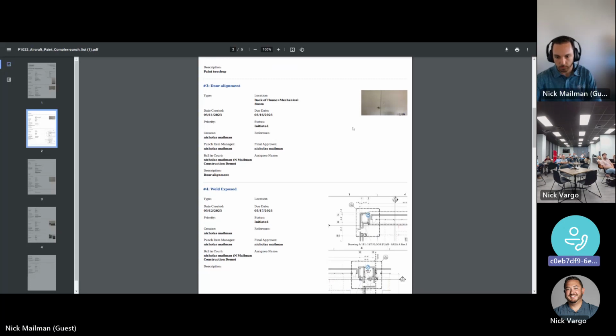I think it comes out on there, but again, the QR codes hung up. We printed ours 8.5 by 11 and stuck them to every door. You can also print the little labels if you want to stick them in the hinges of the door. We've done both. That works super great. You just walk past with your phone, scan it, and it'll pull up, like he said, only their punch items for that room.